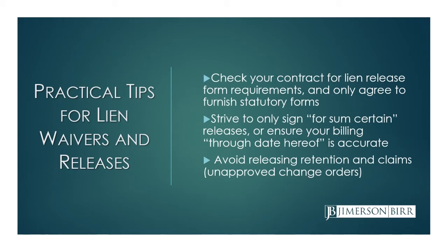Also, throughout the course of the project, when the contractor requests you provide a lien release, make sure that the release they're asking for comports with your contract's requirement. The only types of release that they can require from you are the ones set forth in the statute or described in your contract. So if they're asking for anything else, you're not required to give it to them.